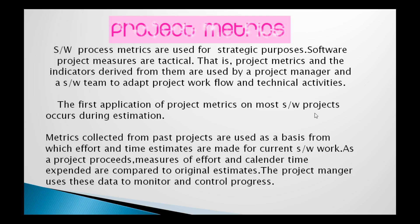The first application of project metrics on most software projects occurs during estimation. From the very first phase, we develop metrics during estimation. Metrics collected from past projects are used as a basis from which effort and time estimates are made for current software work. If the previous project is related to the current project, we can follow those same metrics here. If they are completely different projects, the past project metrics cannot be utilized here.